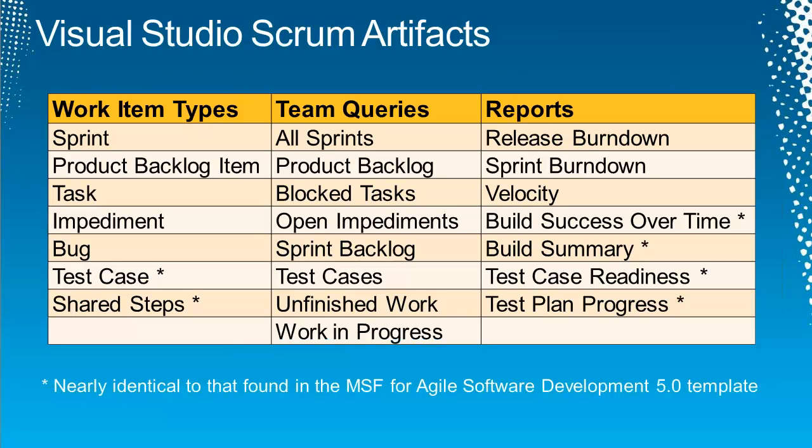Now, not getting too much into process here, but if you're changing up the teams or if you're doing lots of context switching, you're alt-tabbing between projects, this will drop your productivity, as we all know, and it'll impact your velocity. So the whole concept of throwing more developers at a problem to make it solved sooner is a bit of a myth. I mean, it will eventually work, but there is that forming, storming, norming, performing cycle that has to occur, and Scrum will light that up, and you can see your drop in velocity as you're doing that.